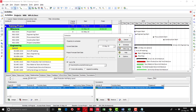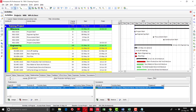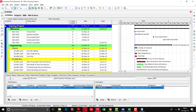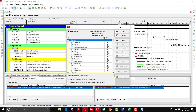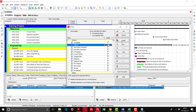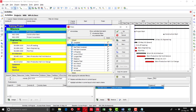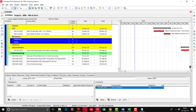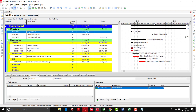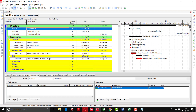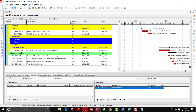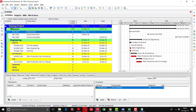Now I will show how to see the critical activities in the schedule. Go to the filter option — a default critical filter has been created. Applying this filter shows only the activities on the critical path, which are the activities that need more focus for timely project completion. Any delay in one of these activities will cause the project to delay. Viewing the total float on all these activities shows it is zero.